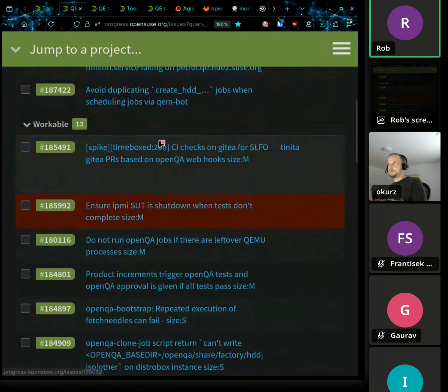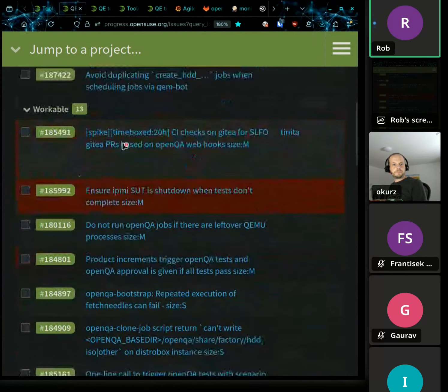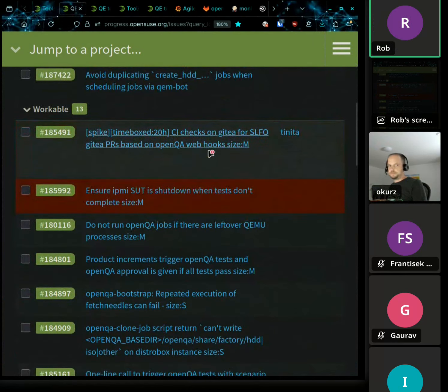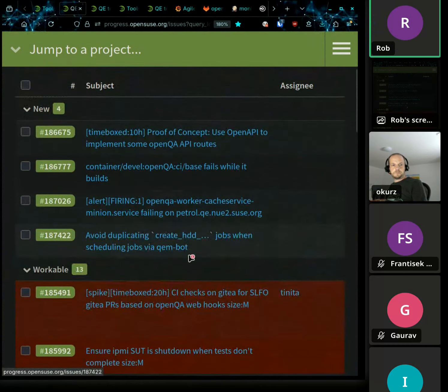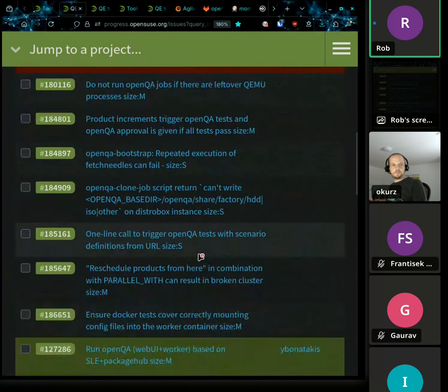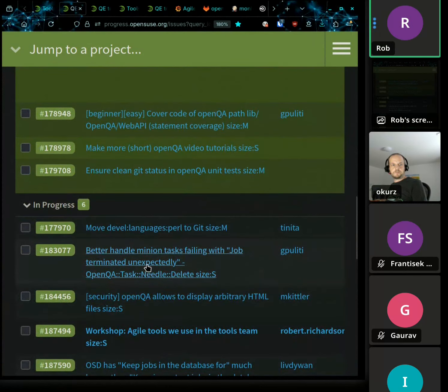One could take a ticket here as a developer. Those are all already estimated in our estimation meetings. Those happen once a week. We have 2 of those, one for each sub-team. And once a new ticket is estimated, it will go to workable, and then anyone can assign it. And in theory, of course, we can also pick an unestimated ticket and estimate it later, but already work on it. So this would move the ticket to in progress.